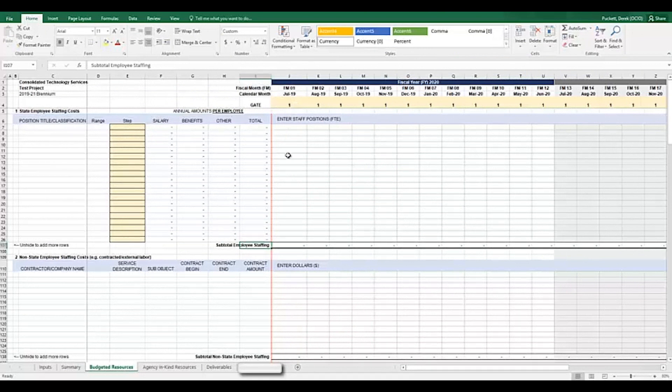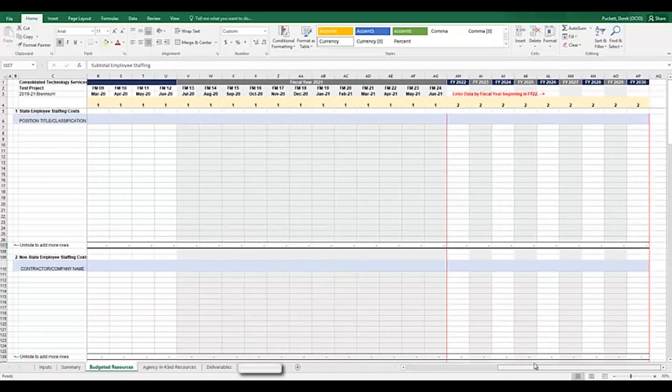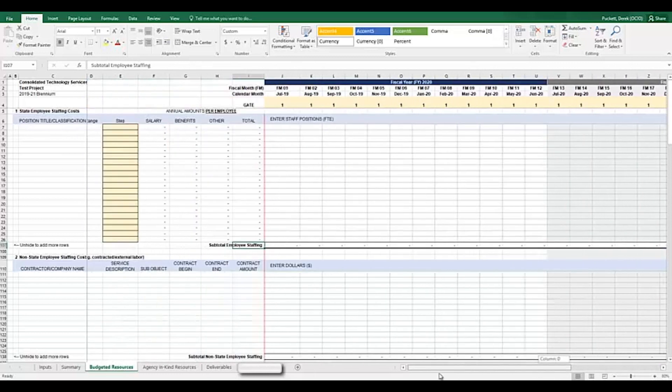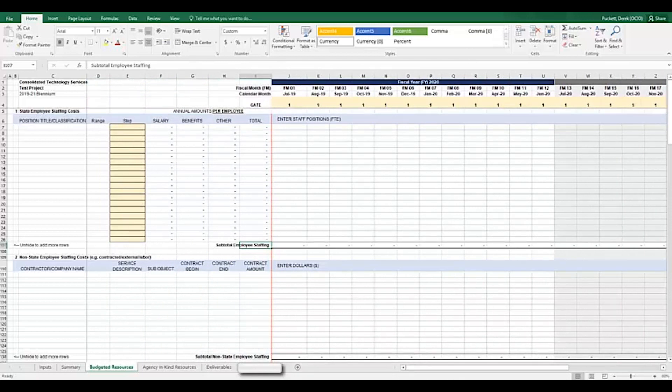Next, I want to draw your attention to columns J through AG. These columns indicate fiscal months in the biennium. I will refer to these as the months column for the rest of this video. Projects will need to estimate costs in the month that they anticipate spending them. For years beyond the current biennium, data is expected to be input on a fiscal year basis. You can see those out-year columns in columns AH through AP. As just another reminder, the budget bill outlined a staged process to receive funds for your project instead of all at once.